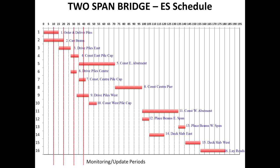For illustration, let us take every 10 days — it is a nice period. I would also like to mention that in this schedule we have taken continuous days, not calendar days. If you put this into professional software and add a calendar, you will find the schedule changes based on holidays and other things. So if you put this into Microsoft Project or Primavera, the calendar comes into play and the days will certainly change; the duration of the project will increase.